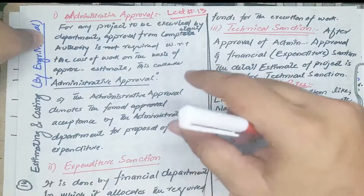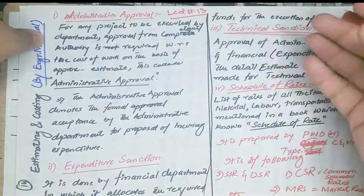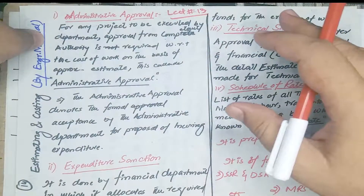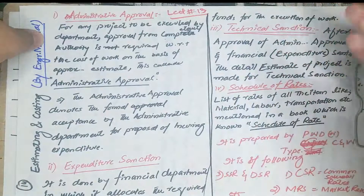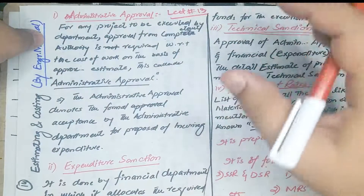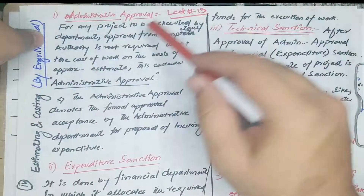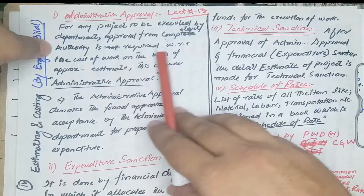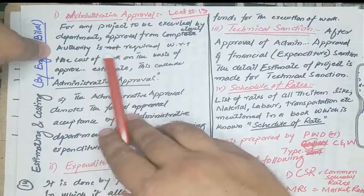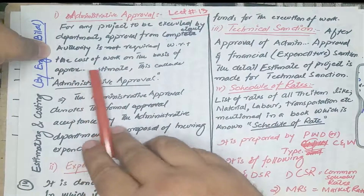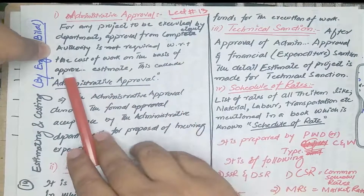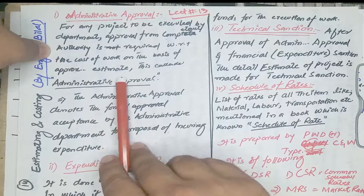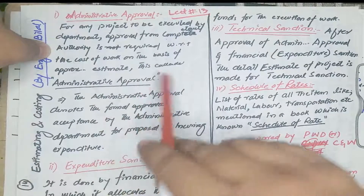Administrative Approval is for projects to be executed by departments like PDWD, CPWD, CNW, Communication Works Department, Irrigation Department, and some other local government departments. We approve the total project by the competent authority with respect to the cost of work, on the basis of an approximate abstract estimate or rough cost estimate. This is called Administrative Approval.